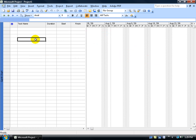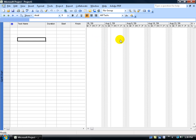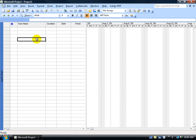when you enter in a task here, a task name, like I want to clean out the fridge. And then you enter in how long it's going to take, like two or three hours, or a couple weeks or months. And then you'll enter in the start date, and then with the start date, combined with the duration, it'll give us the finish date. And then over in the chart view, it'll display a corresponding bar that will span that timeline, or that duration. One week, two weeks, or three weeks, and so on.